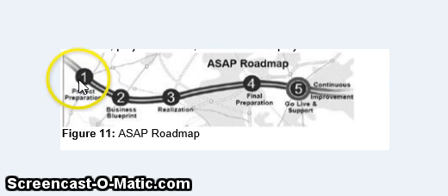The first phase of the ASAP roadmap, which consists of 5 phases, is project preparation. In this phase, you plan your project and lay the foundations for successful implementation. It is a stage where you make the strategic decisions crucial to your project. Define your project goals and objectives, clarify the scope of your implementation, define your project schedule, budget plan and implementation sequence, and establish the project organization and relevant committees and assign resources.